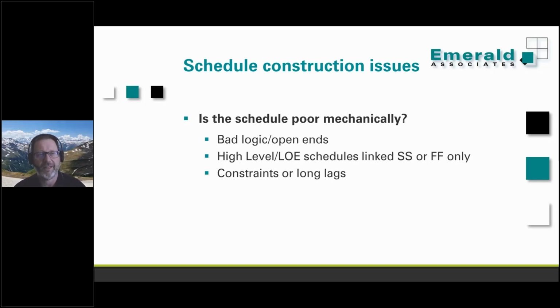So he said, well, that doesn't look right. How could over 3 years the difference only be 3 weeks? So we looked at it together, and very quickly what we found was in this schedule of 1,500 activities, there were 500 constraints. There were also about 250 start-finish relationships, which is the most I have ever seen in any schedule in my career. So we could pretty much decide right off the bat that we had some issues around the schedule.